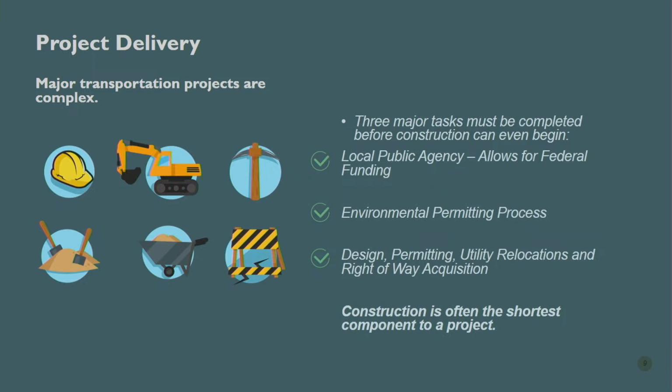And then, of course, right-of-way acquisition. Very sensitive with right-of-way acquisition. We don't want to have to take anybody's property if we don't have to. And I bring this up to just illustrate that construction is often the shortest component to any transportation infrastructure project.